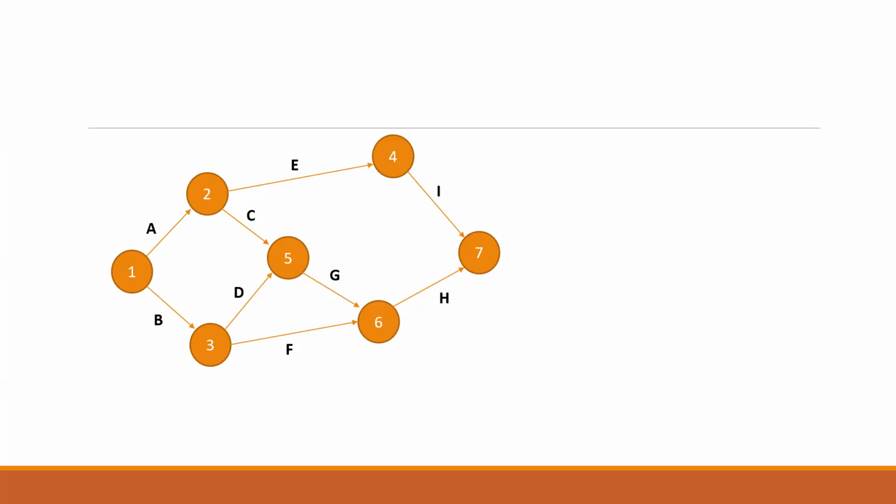And finally, we have J, which will come out of 7 because J has the preceding activities H and I. So here I have J, and the last one will be K, which is giving the finishing touch, which will be coming out of 8, and we have this last node 9. So this will complete my network diagram. Now to explain how I gave the numbers: as I told you, you start with the first node and give the number 1 here. Then hide the arrows which are coming out of this node.